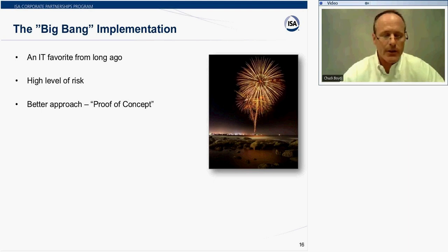So all the successful projects that BMEX has been involved in have used a gradual rollout approach to implementation. This is where we plan and schedule the deployment and the implementations, but we pick one proof of concept site. And at this site we will plan, implement, and put the system into production. This is going to show value, establish credibility with the system, and provide visibility to the other sites and get their input as well.